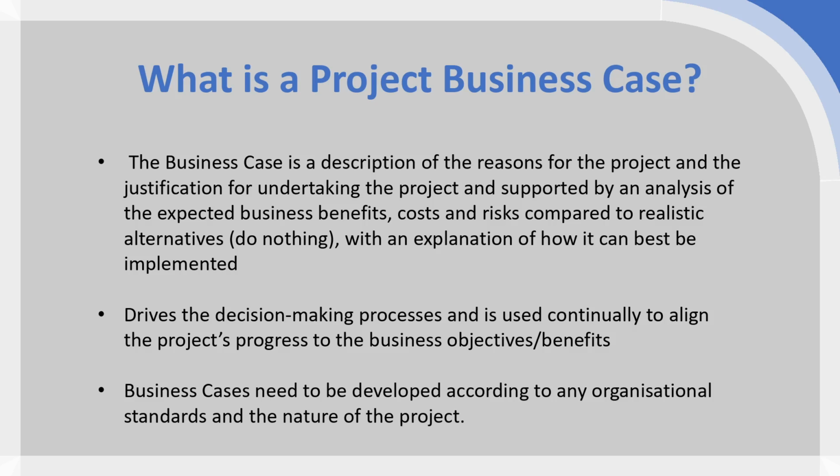So if you have a project business case which presents a justification for your project, which explains what the business benefits are, what the costs and the risks are, and then is used to approve the project, well then perhaps later on during the actual execution of the project, something changes. Maybe the market changes, maybe something within the environment changes, and your risks and the disbenefits and the costs now actually outweigh the positive benefits.